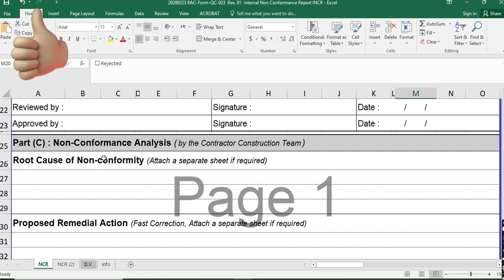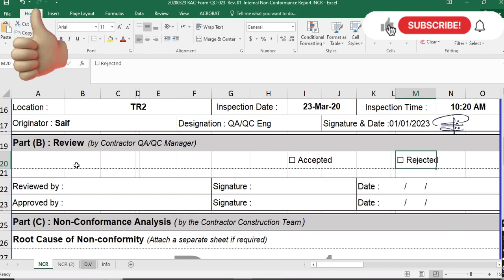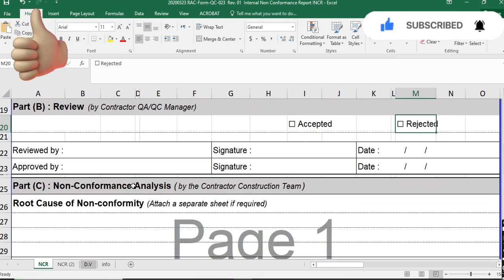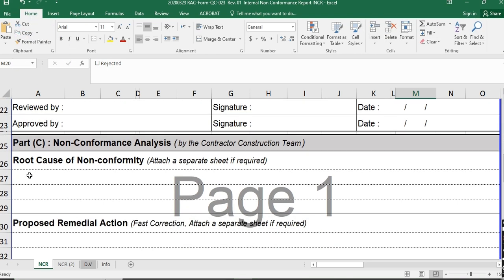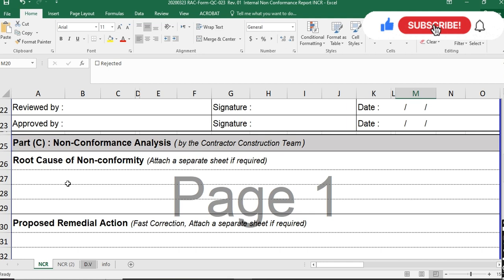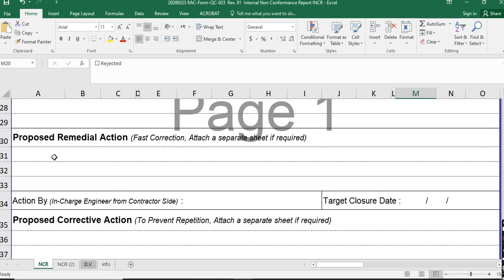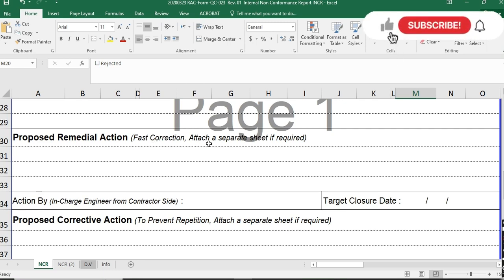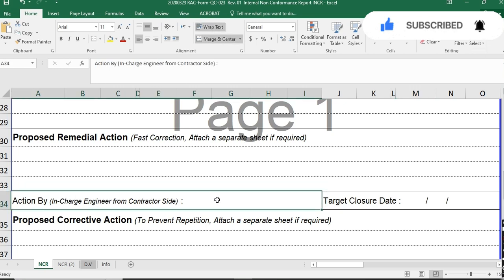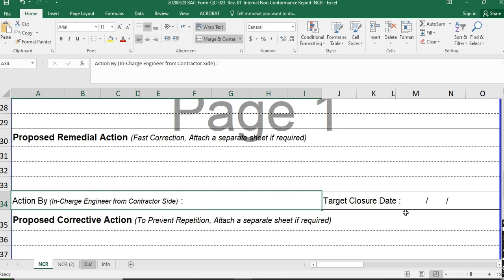Part A is for the QAQC engineer, Part B for the QAQC manager, and Part C — non-conformance analysis — is for the contractor's construction team. They write the root cause of non-conformity, explaining why, for example, unapproved mix design concrete was used. They also fill in the proposed remedial action for fast correction, attaching a separate sheet if required. The site engineer or construction manager fills this section and writes the target closure date.